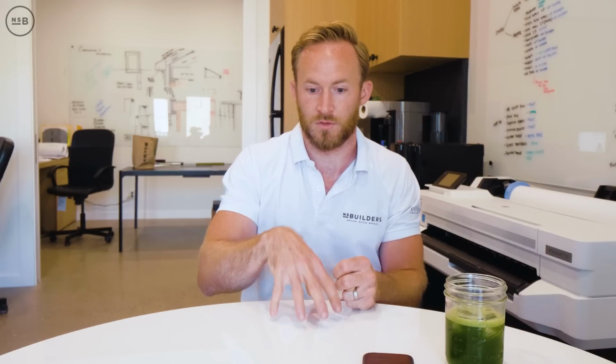Time and material is a set time rate. And this is, I think, even myself included early on, I got tripped up on, where cost is defined as your actual cost. So it should be the actual cost per man hour, where time and material might be an hourly rate. So for instance, if you're paying someone $25 an hour, your cost on them is probably somewhere, based on my math, $36 to $40 an hour, depending on what benefits they have and things like that. So you're going to be wanting to bill them out at $36 to $40 an hour, but maybe you want to make a little bit of money on them. So maybe you're billing them out at $50 an hour. That can be a time and material. There's where you're making some of that money.